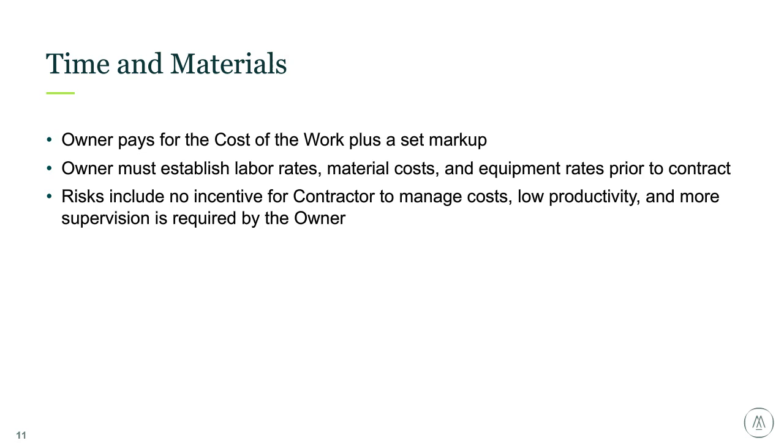These are typically performed for small projects that are fairly straightforward. For example, like a small paint job that needs to get done now. These jobs are typically labor intensive, and as stated before, having established rates up front can prevent excessive charges. So requesting documentation such as names, positions, dates, hours, rates, description of the work performed, and having someone on site managing that type of work is critical, so that when you get the monthly or weekly invoice, whatever the invoice cycle is, you can identify excessive labor rates or personnel that weren't actually working on the job.